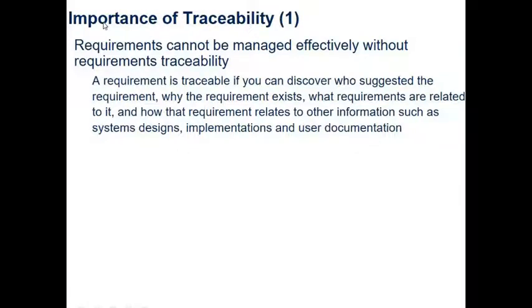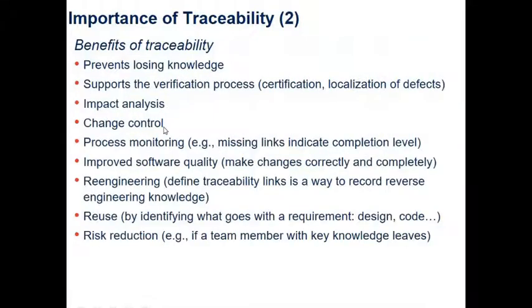Okay, importance of traceability. Requirements cannot be managed effectively without requirements traceability. A requirement is traceable if you can discover who suggested the requirement, why the requirement exists, what requirements are related to it, and how that requirement relates to other information such as systems designs, implementations, and user documentation.